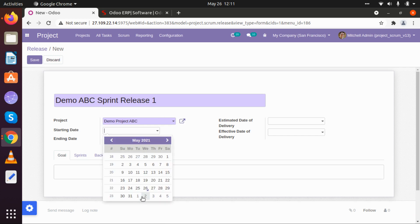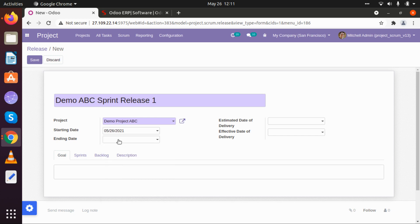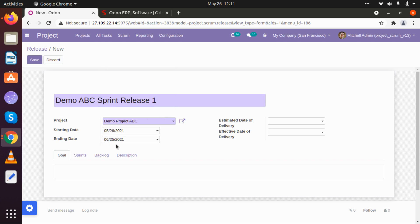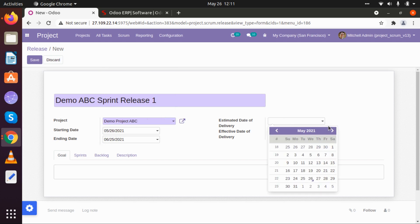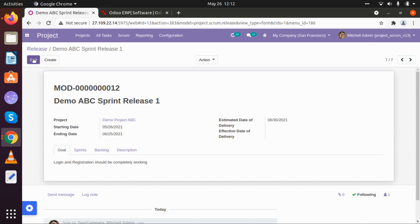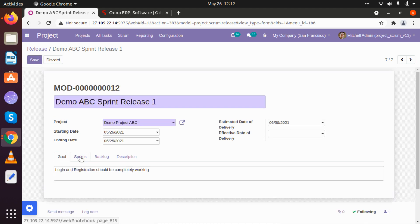I am going to create this sprint for one month, so that will be from 26th May to 25th June, and I am going to keep the delivery time of this sprint as 30th June. I am going to set that particular goal as 'Login and registration operation should be completely working', and I am going to save this particular sprint release. Now let's go to edit and create our different sprints.